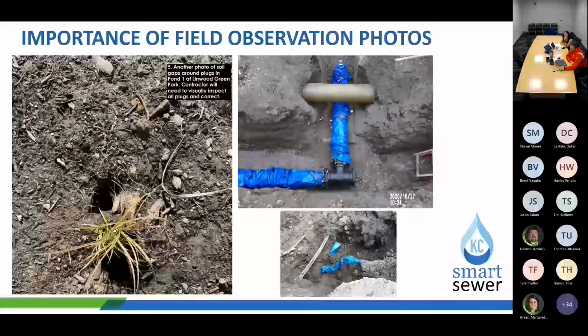So maybe later on down the road, if a number of these plants were to die, the contractor can't come back and say, well, it was from such and such event, plants were flooded or something along those lines. You could look back and say, well, no, here's what went on. We have this photographic evidence of these plants not being fully planted.